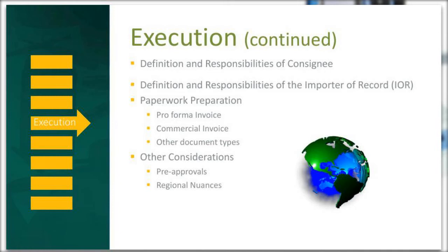An IOR in the export compliance business is the importer of record. It's critical to understand that the role of the importer of record is the legal entity responsible for ensuring that the imported goods comply with local laws and regulations, filing completed duty entry and associated documents, and paying assessed import duties and other taxes of these goods.